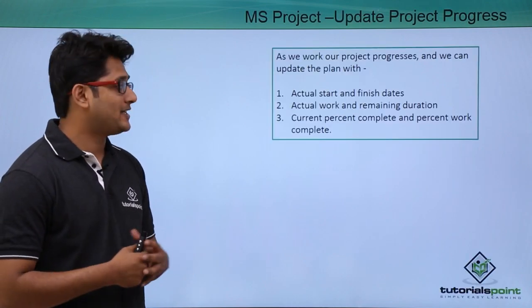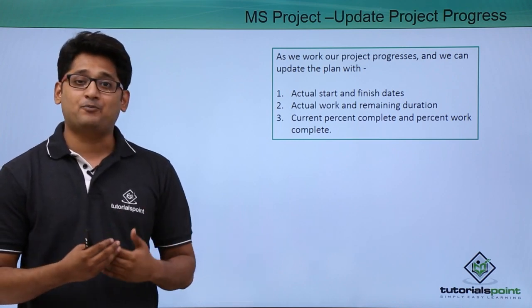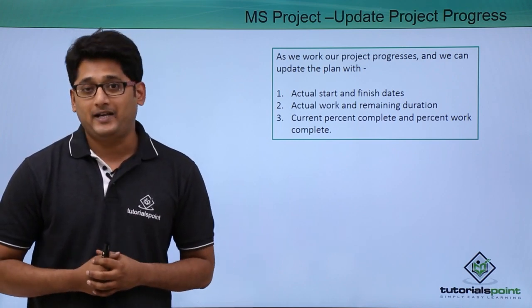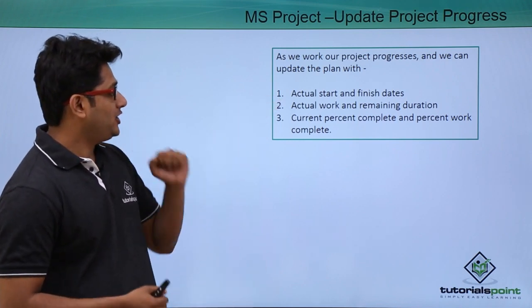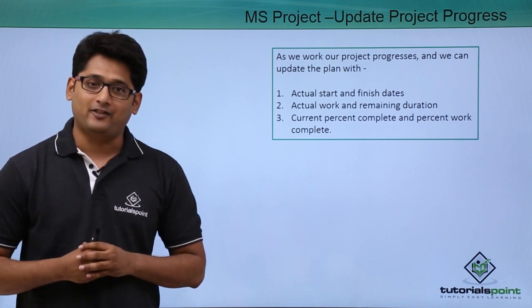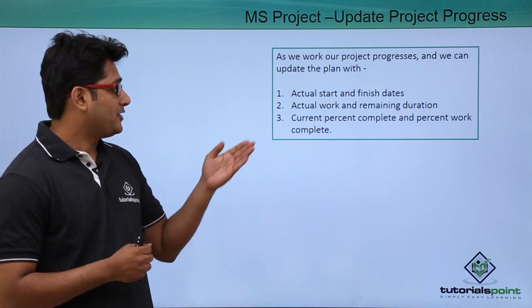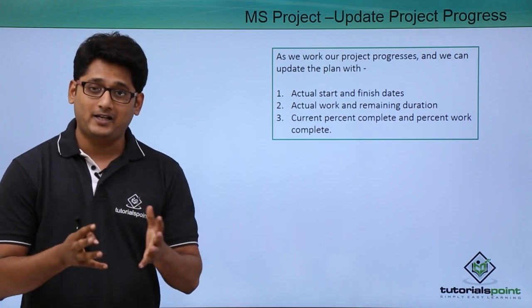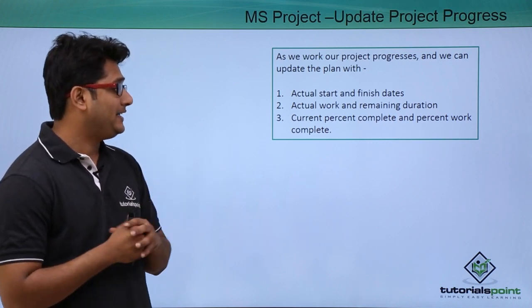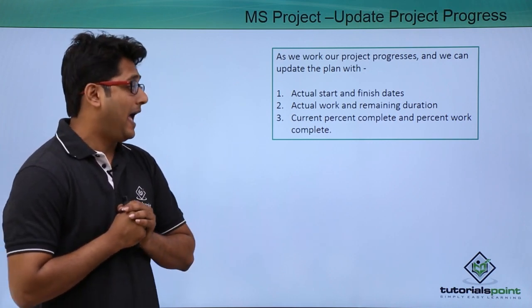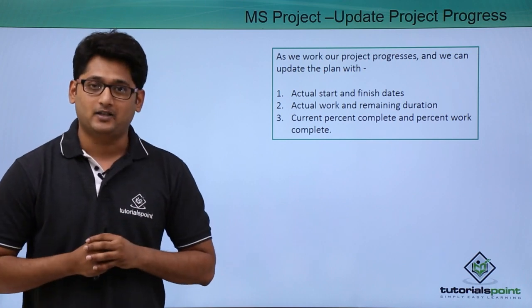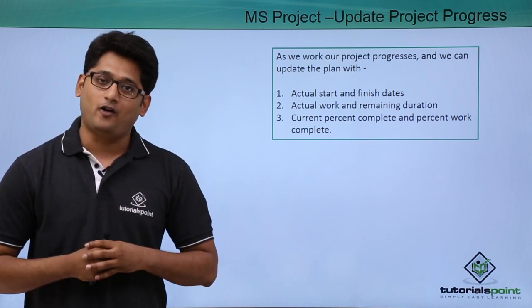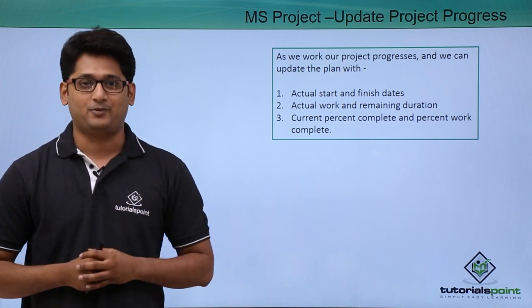As the name suggests, as our project progresses we can update the plan by changing the actual start date and finish date of the project, by changing the actual work and remaining duration, and by updating the current percent complete and percent work complete. We will have a better understanding of these constraints in our practical approach.